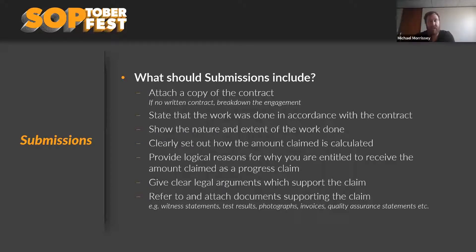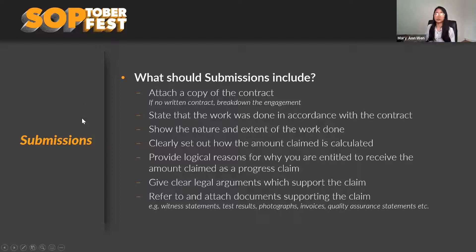It's really important — we've still seen adjudication applications put in where the person hasn't even stated they've done the works. An adjudicator, irrespective of the merits of the adjudication response, still has to satisfy themselves that the construction work or related goods and services were done or supplied. In the absence of evidence for that, an adjudicator may simply say 'I can see you've put in a claim but I can't see that you've done that work.' Those primary documents — photographs, time-lapse material showing incremental change on site, delivery records — become critical.